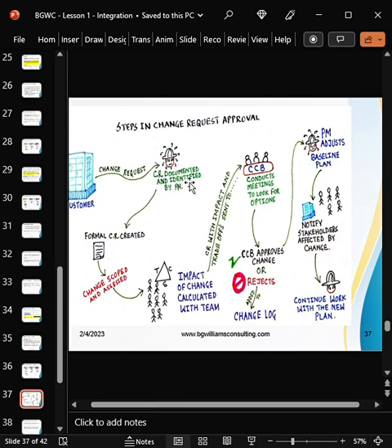And the PM will have to document that he has identified or received that change request form in what we refer to as the change log or the change request log. Just like you send a mail, you are sending something to an organization, the person registers it. Why are they registering it? So that there will be a record that yes, I have this document you sent, but I'm registering it to show that this document actually came. It must be registered in the change log that there's a change request.